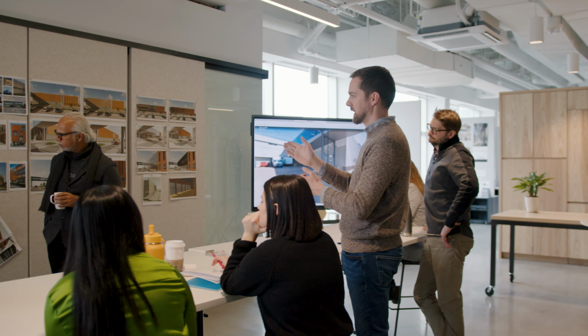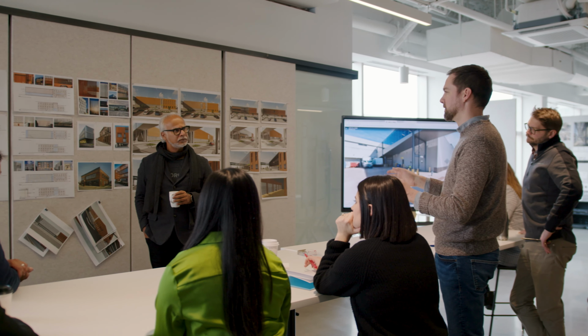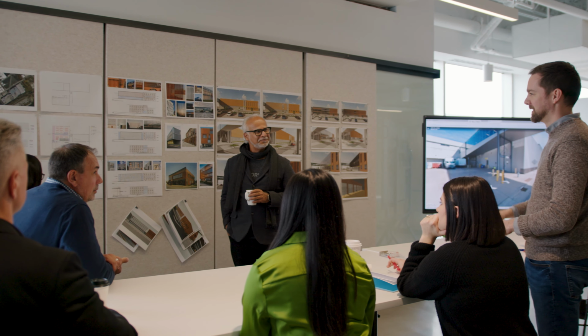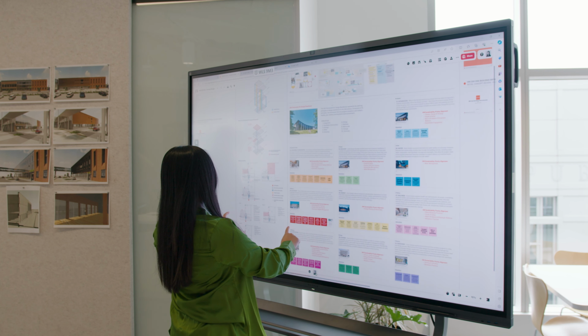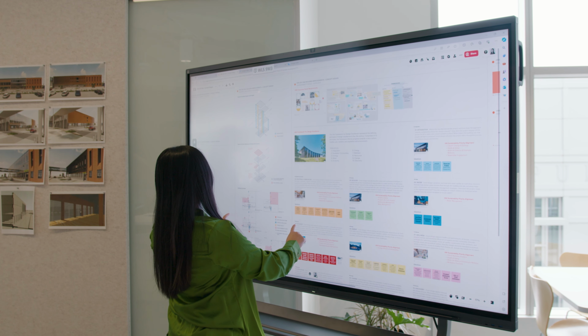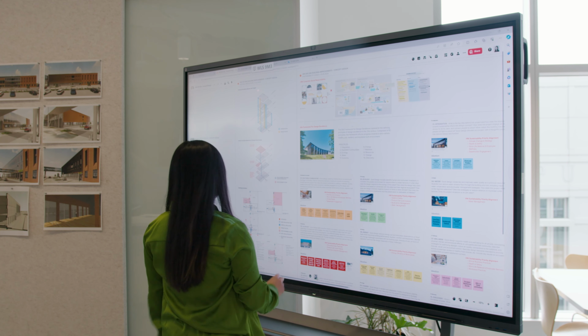If the design scope also includes supplementary services, they would be listed separately on the same monthly invoice. Now, depending on the type of supplemental services and what was agreed upon up front, those might be billed hourly, at a flat rate, or as a percentage of construction costs.